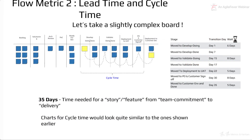Using the same example, looking within the development team, the ticket goes from development doing to validation to deployment to PO and customer sign-off and customer dev. It takes approximately 35 days. In those 35 days, the ticket is actually waiting for more than 31 days — there is more wait than actual work. The ticket waits six days, eight days, five days, eight days, and five days. Essentially, your 35 days is nothing but four days of work and 31 days of wait.